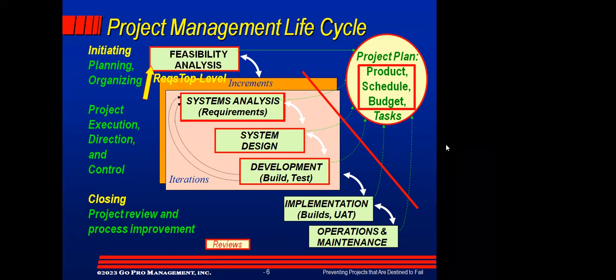In the typical treatment of projects, requirements tend to be considered only with regard to the analysis or requirements phase. And that's the point at which requirements detail is elaborated. But recognize, if the top level requirements have not been defined adequately, then whatever gets detailed is highly unlikely to be right.